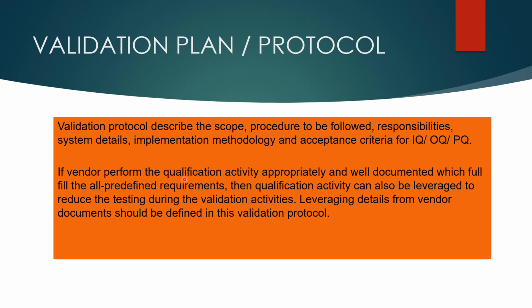And if the vendor performs the qualification activity appropriately and well documented, which can fulfill our in-house requirement as per predefined requirements, then the qualification activity can also be leveraged from the vendor document. It can be very helpful to reduce the testing during the validation activities. It will reduce your time and cost relevant to that project. And when you are going for leveraging the document from the vendor, you need to mention all the details of leveraging in this validation protocol.